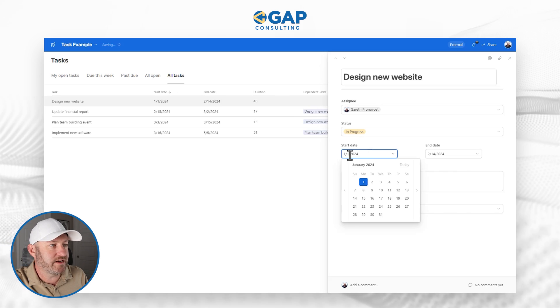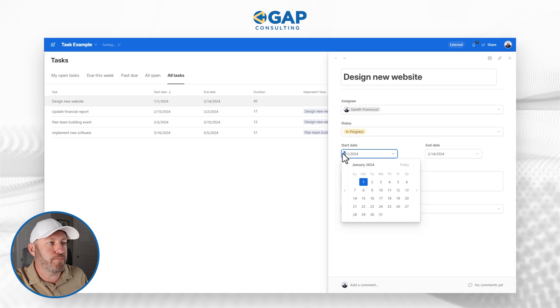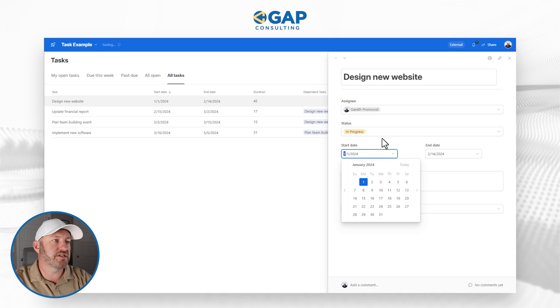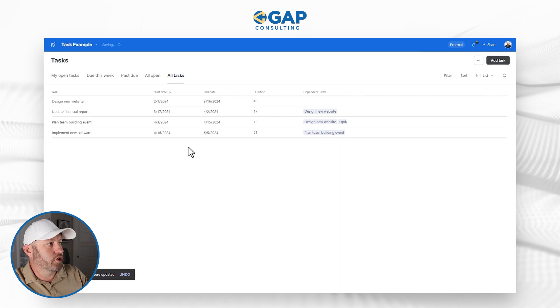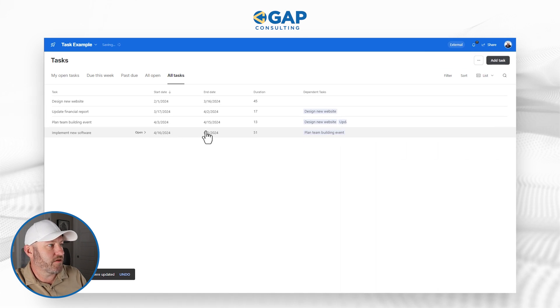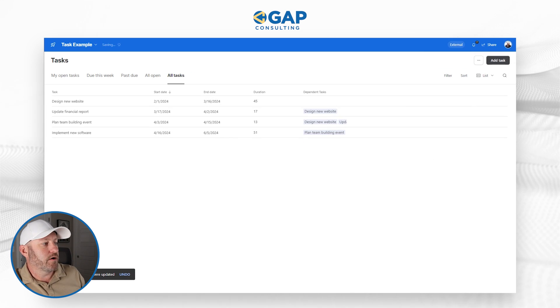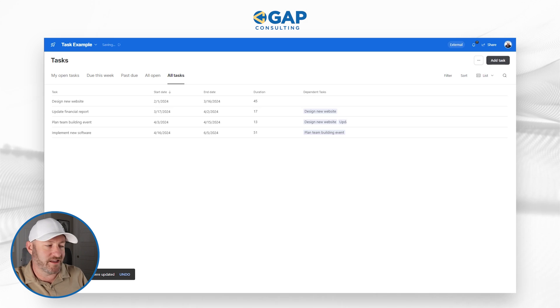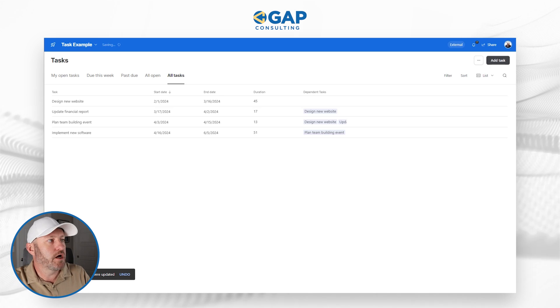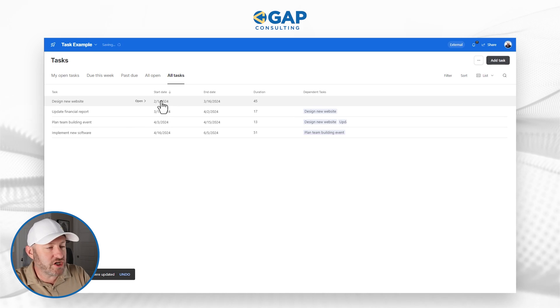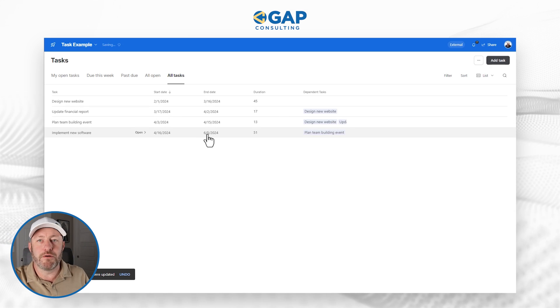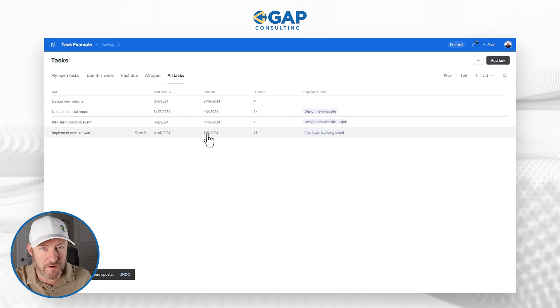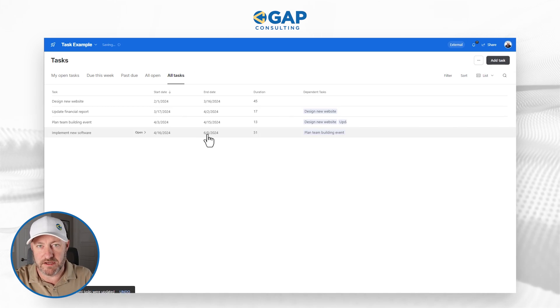Here I am start date, let's say that this project got pushed out a month, and it's not going to start until Feb one. I make the change, look at the recalculation. That quickly everything was updated. We have the popup down here that's telling us that three dependent tasks were updated with the change of that one date. All of this now making sense and perfectly aligned with the updates I made.